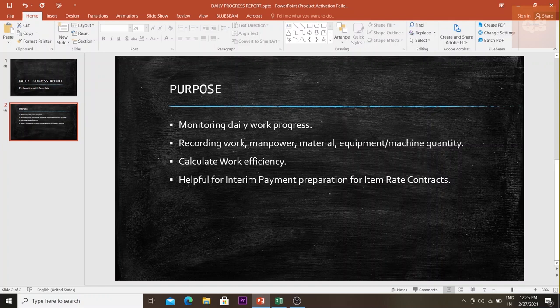The DPR can also be helpful for preparing interim payment applications, especially for item rate contracts. In a lump sum contract, interim payment applications are prepared based on a percentage each month. In an item rate contract, however, you have to provide proof and substantiation for each quantity being claimed in your interim payment application, as the BOQ quantity is already fixed and any increase goes into a variation.